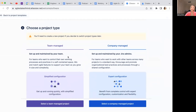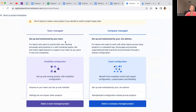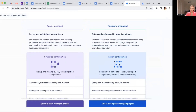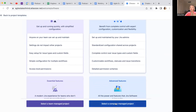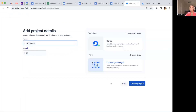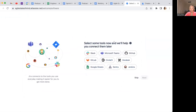Under project templates, they recommend kanban for me, but there's also scrum and bug tracking. Bug tracking is usually for a support team. I want scrum. Important note: you need to choose your project type carefully — if you decide to switch project types later you'll need to create a new project. Then there's 'team managed' vs 'company managed.' If you're a single team where everyone can change everything, team managed is fine. But if you work in a company with many teams and don't want anyone to accidentally break something, company managed is better.